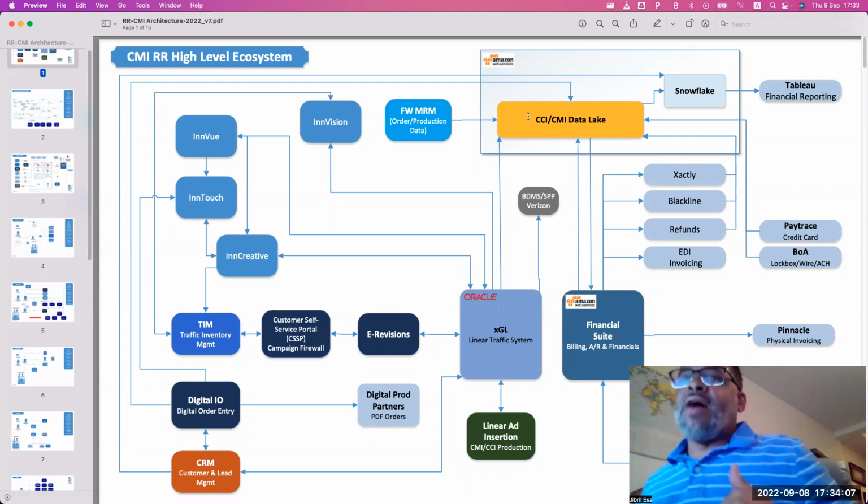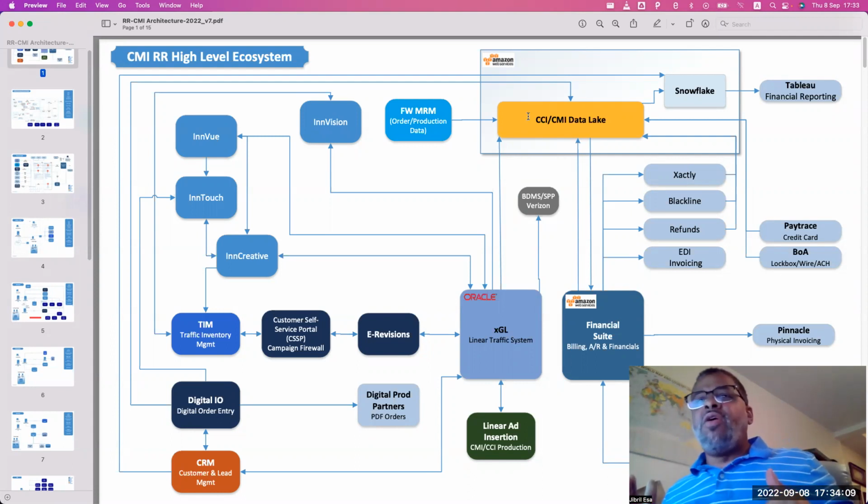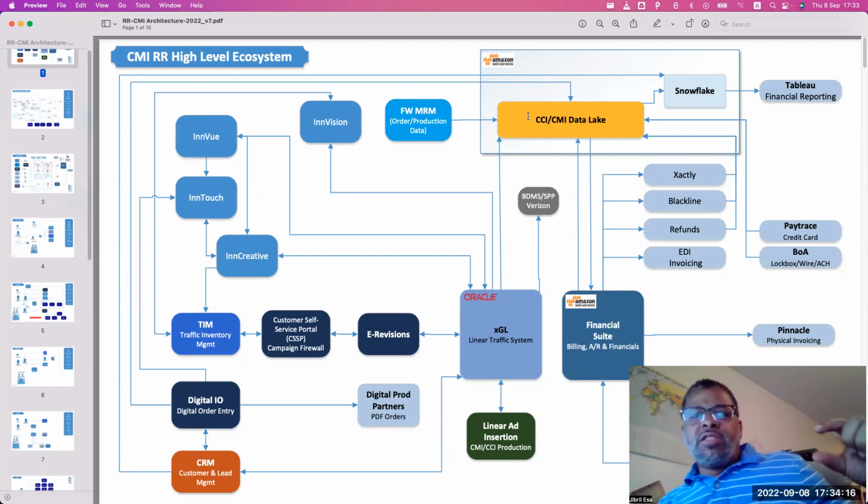Here's how long it's going to take with X number of developers. Here's approximately how many sprints, how many hours. Here's the first phase as a foundation you say you want. Here's the second phase you say you want. Here's the third phase you say you want. Well, what do you want? Well, can you build just this phase and this phase? Yeah, okay, so this is the functionality you say you want. They say yes. We go build that.